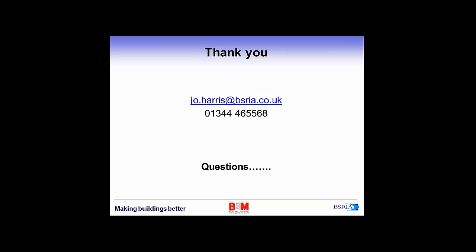Okay, so no one's really come up with a figure yet for savings. One of the early case studies that came out of the trial projects had an example of a light fitting in an atrium that had blown. So you can work through this scenario. You need access equipment to get to the light fitting. You have to do it on a weekend so nobody else is there. You take the light bulb out, you find what type it is, you go away, you wait 6 weeks while you order it, it comes back, and then you put the scaffolding up again for the next weekend, put it in.